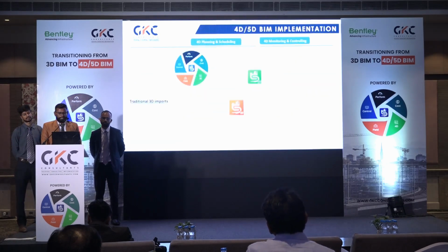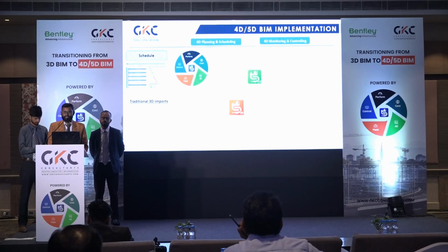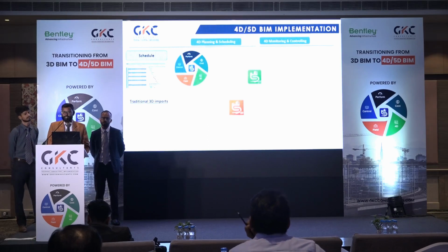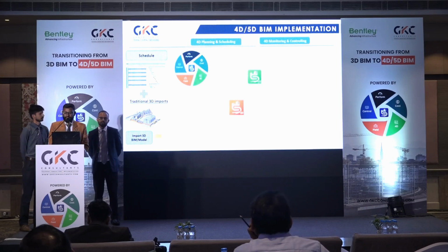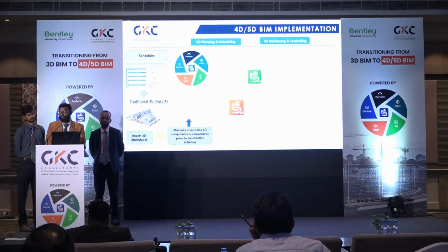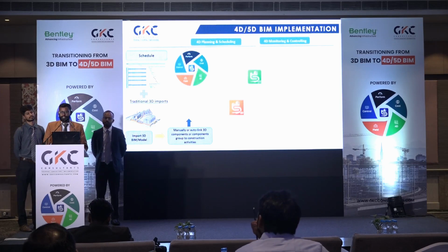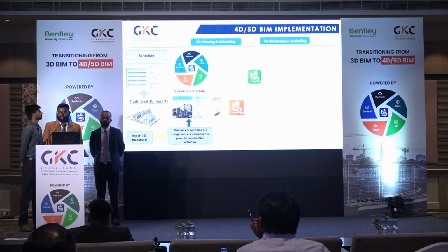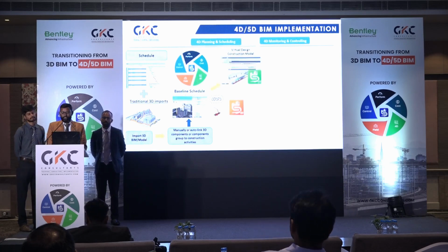This is the normal 4D, 5D implementation preferred by the client, and we also suggest it as the first step for the digitization of the construction project. We take the schedule from the planning team. In the traditional approach, we take the BIM model from the design team and integrate both either manually or, if automation of that process is required, by giving ID tags to the elements and the same ID tags to our schedule. We link it together in Synchro. From Synchro, we integrate the cost data also, which makes the 5D.